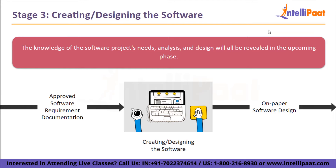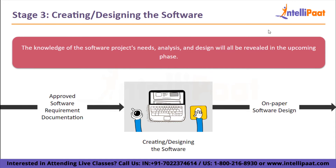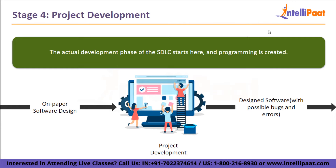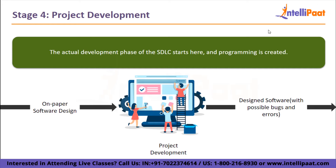Stage 3 is creating or designing the software. The knowledge of the software project needs, analysis, and design will all be revealed in this phase. This phase is the result of the previous two — requirement analysis and client input. Stage 4 is project development. The actual development phase of the SDLC starts here and programming is created. Coding represents the start of design implementation. Programming tools including compilers, interpreters, debuggers, and similar tools are used, and developers must adhere to the coding standards outlined by their management.